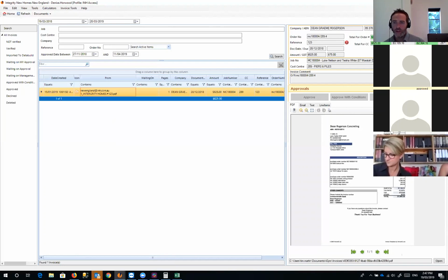All that data matching, to match the details to the right job and the right cost centre, does rely on having good purchase orders. The way you're running your business at the moment, you've got an estimator creating your purchase orders up front, which is definitely the way to go. You get the benefits of knowing whether something's gone over order, matches the purchase order, and data enters to the right jobs and cost centres. It's a lot, but it's working really well.